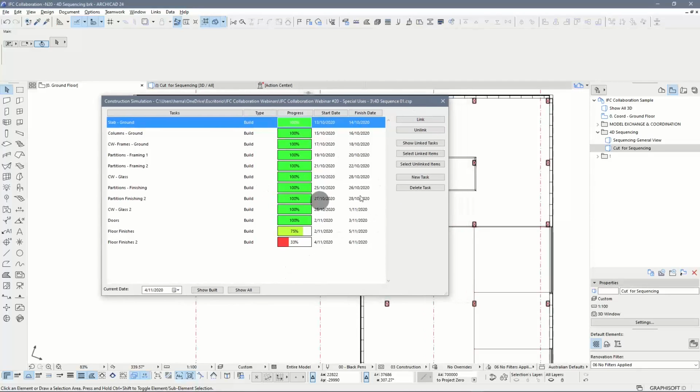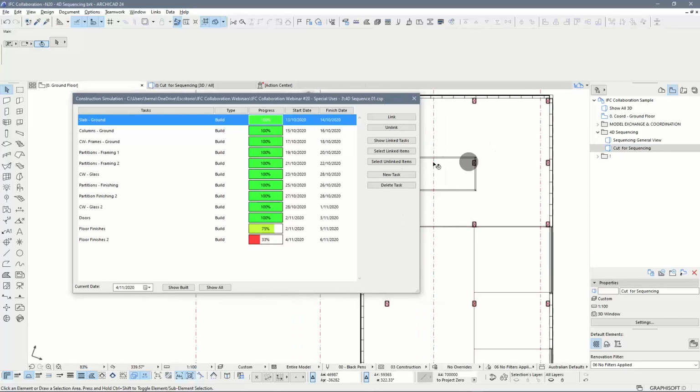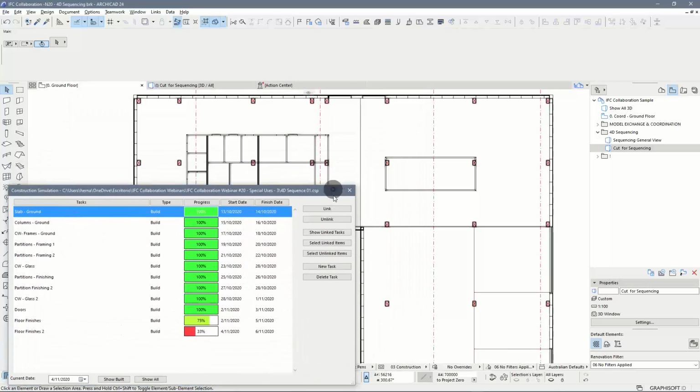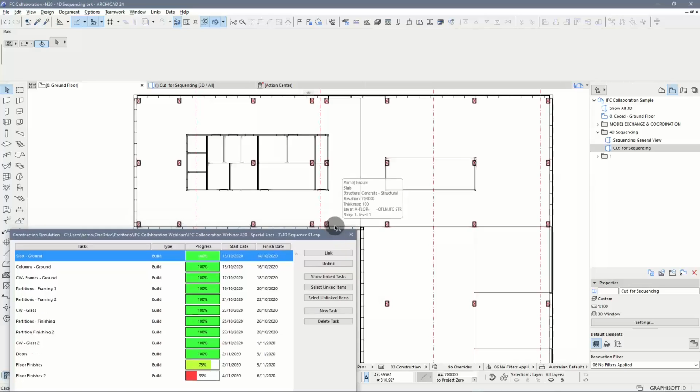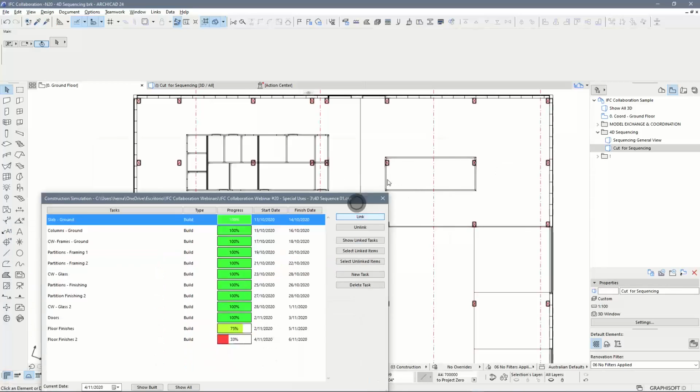This is not being saved with views, so that will be another limitation, but you can use it on the fly. It can be reflective of your plan views if you just leave it static like so. The only thing you won't be able to do is to print a drawing with one date and another drawing with another date at the same time. So you have to go and move one at a time. But you can see that there is some advantage to that if you are in the position where you need to take control over that.